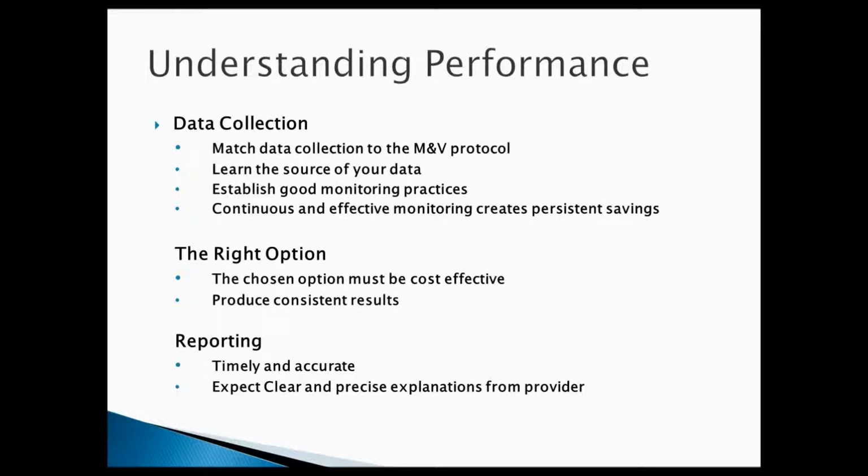Reports are usually annual. You can negotiate to have them more often. Just remember again that measurement and verification services cost money. And remember again that it is a written check to your M&V provider, aside from paying back your financial institution.